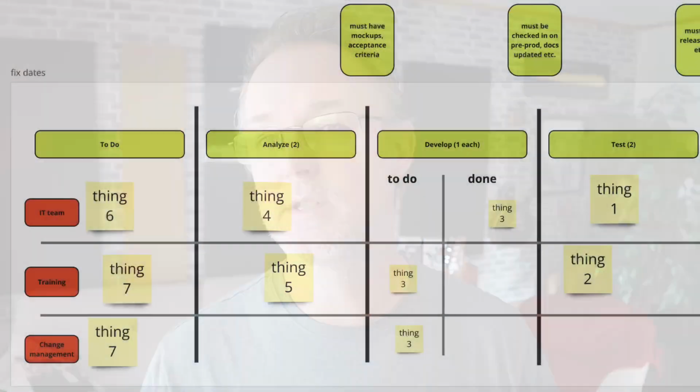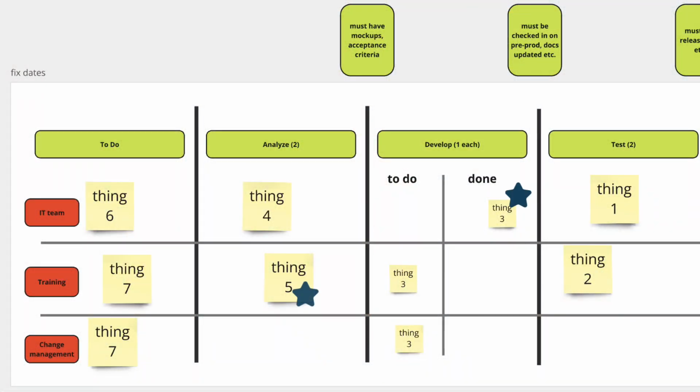And then you can do some really cool things like link those together through symbols so you can identify and manage dependencies. And depending on the scope of your Kanban system, what you're trying to visualize, you might have different workflow states across different swim lanes, but in the event you're working on a project go live, say for a systems implementation, you can very quickly have a simple portfolio level Kanban that might have a swim lane for development work, a swim lane for vendors, one for change management, one for training.